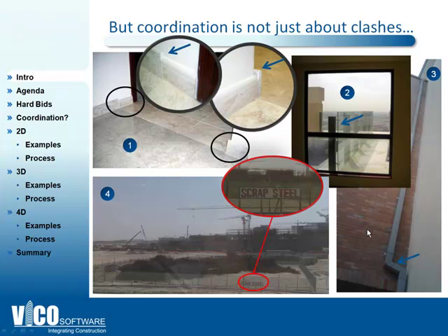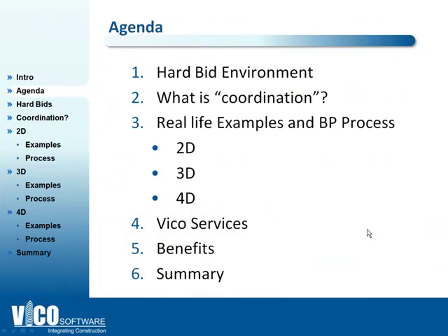This is a site that I worked on in the Middle East, and not nice to see it being advertised as scrap steel, because this is actually over delivery, over orders, an incorrect delivery, and really just such a waste. But 2 football fields full of scrap steel that a just-in-time procurement schedule that had been coordinated might actually be able to mitigate. So that's an introduction into what we're going to talk about today.